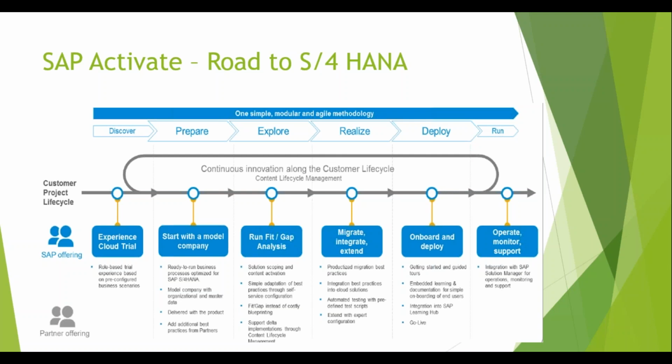And because you need this system, I told you one activity will be added in the prepare phase, which is nothing but making sure that the system is ready, which will be used for the explore phase. So in the preparation phase, apart from the normal project management planning activities, the resources and all, you need to consider the server also, which will be used in the explore phase. So in the prepare phase, no change. Whatever activities you carry out, you will do, plus one additional activity of making sure the server is ready.